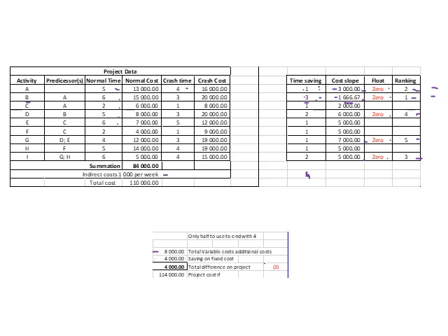So there's a cost saving here. So you can see what the implication was. If this was, for instance, 3,000 Rand, we would have gotten a cost saving on the project. If it's reduced, it would have amounted to 12,000 Rand of fixed cost savings that we could have put in here. And then what I've done here is I've just calculated the added amount and the reduced amount, and indicated that we've got a cost difference of 4,000 Rand, which is an addition to our 110,000 that we had here,